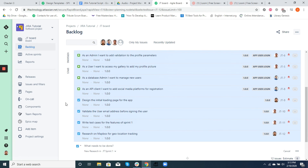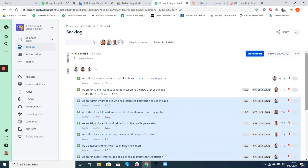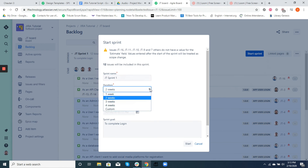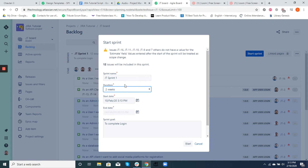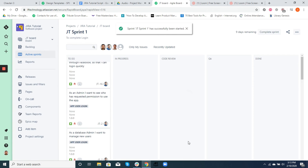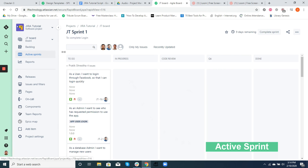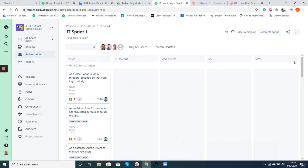The number of tickets we take in a sprint are based on team velocity and estimates, which we shall talk more about in a later video. Now that we have planned the sprint, we can start it by clicking the Start Sprint button. By default you'll see the sprint name, the duration, and the start and end date of the sprint. You can change the duration as you like. In our case we are starting a two-week time-boxed sprint. After the sprint is started, you can view the sprint's progress through Active Sprints, where we can see the statuses of the tickets based on the workflow you have set up.